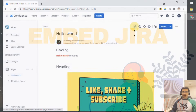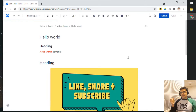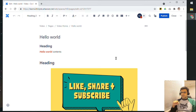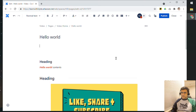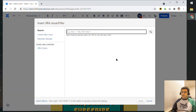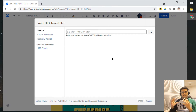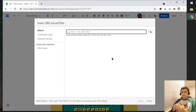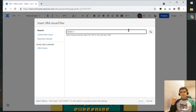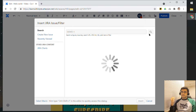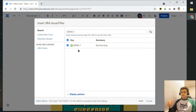Next up, we'll take a look at embedding Jira information — Jira tickets — into your Confluence pages. To do that, hit Enter and then do a forward slash Jira. This does assume that you have signed up for Atlassian's Jira product as well. But let's assume that you already have a Jira project going on. All you need to do is search for that key, a particular Jira ticket or Jira story. Click on Search, and your Confluence should be able to find that particular ticket, and then you can just insert it.